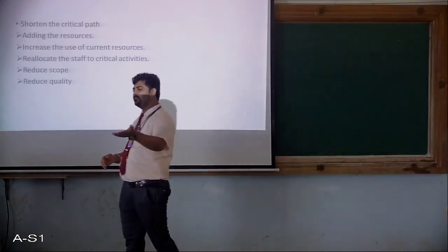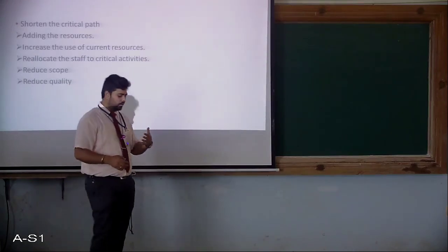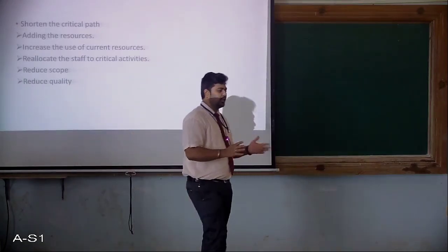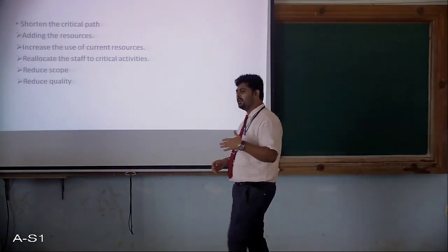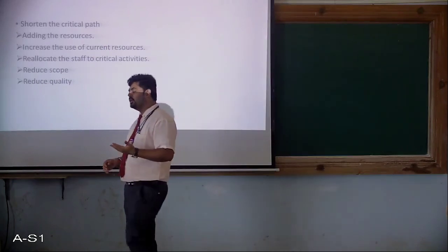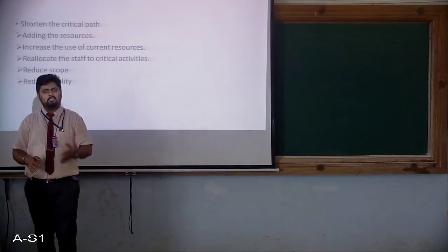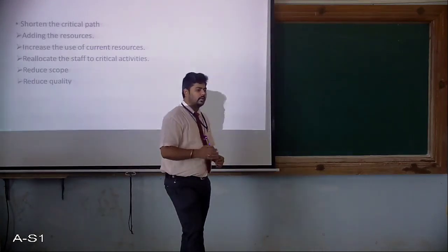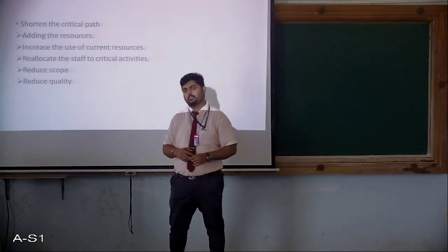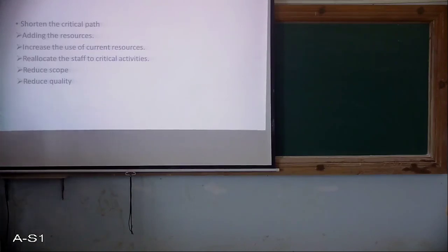When you implement it for the trial purpose and when you start using it, then you are going to get the different issues. So system testing can be curtailed. It is not mandatory that you don't have to go for system testing, but if it is not actually needed, then you can cut it and invest time or money in some other aspects. So in such a way, you can reduce the quality wherever it is allowed.